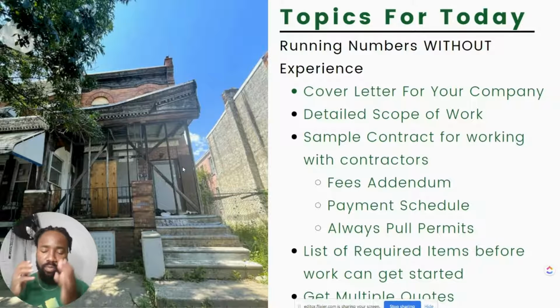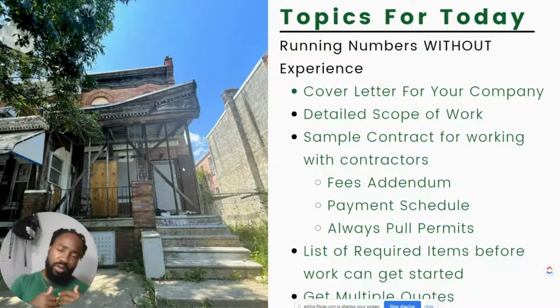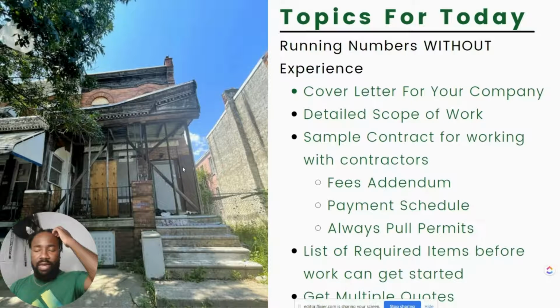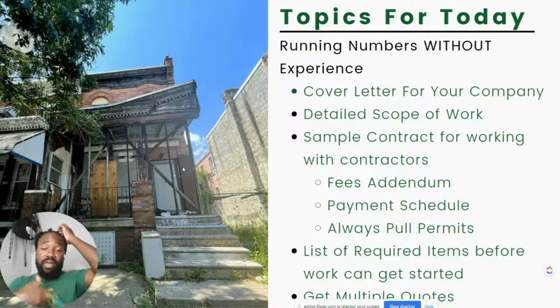And then it forces you to put it on paper, which you want to print out and give to people that are bidding on the work, and that way they have proper guidance. And also, when they submit their bid, they're only bidding on the stuff that you have in the packet. Now, if a contractor goes out and says, "Oh, well, there's other stuff I think that I didn't see that's in this list," right?